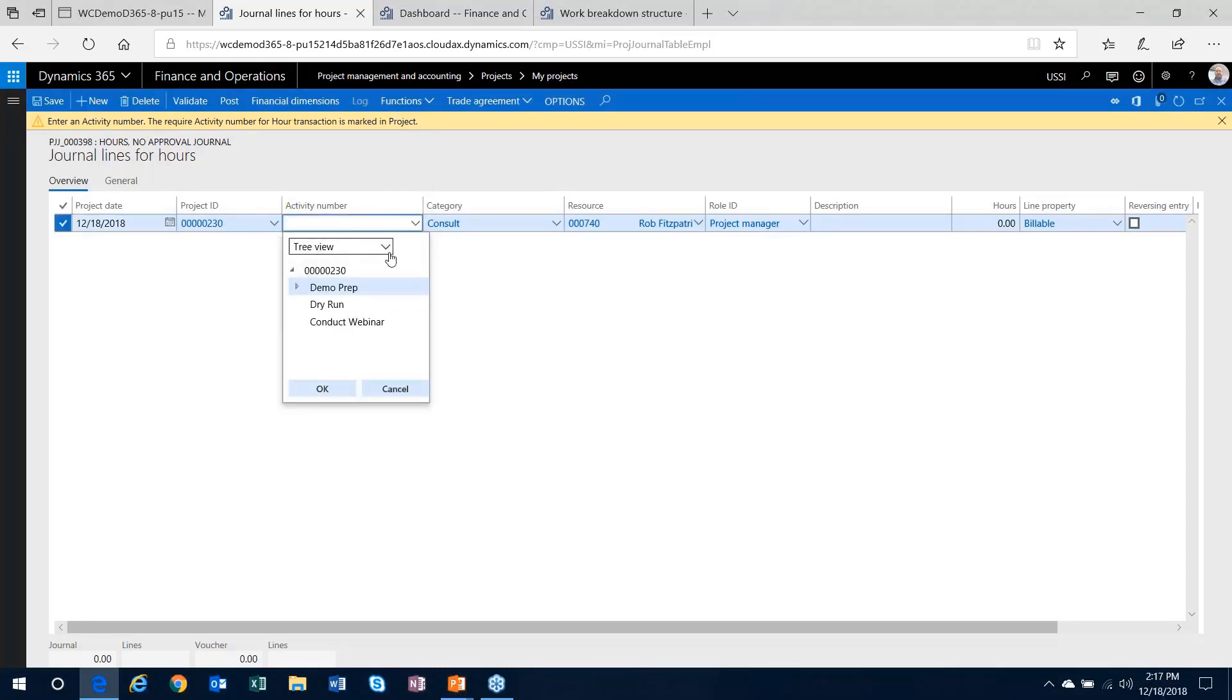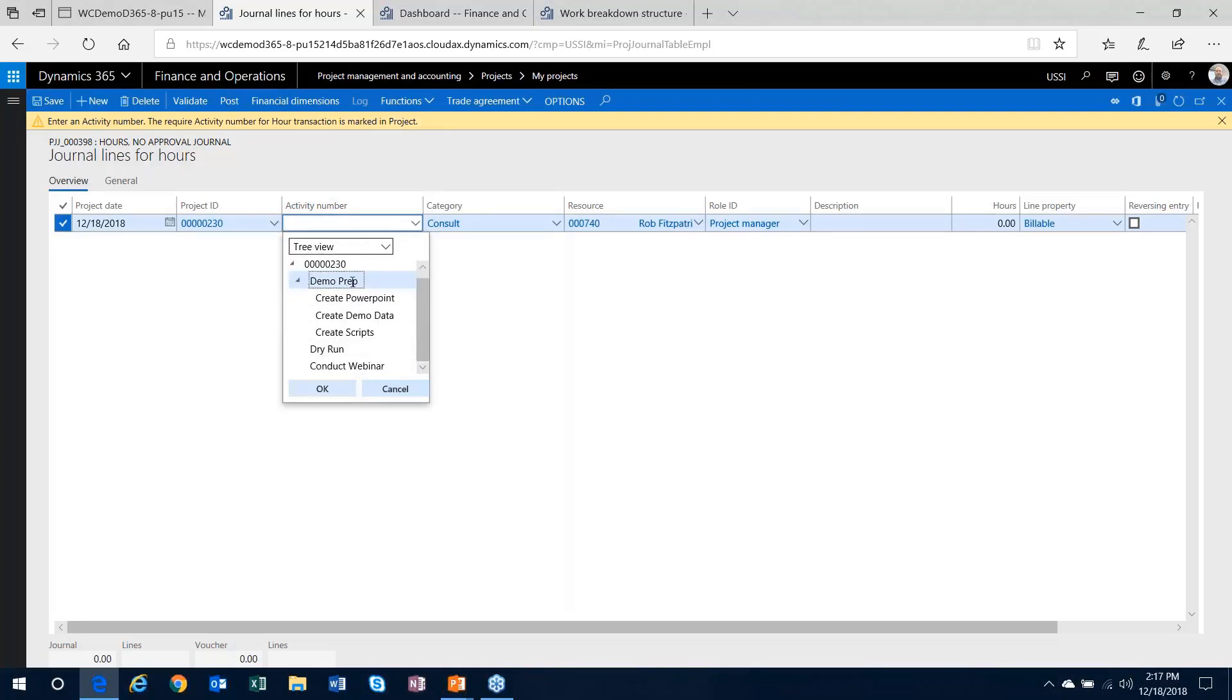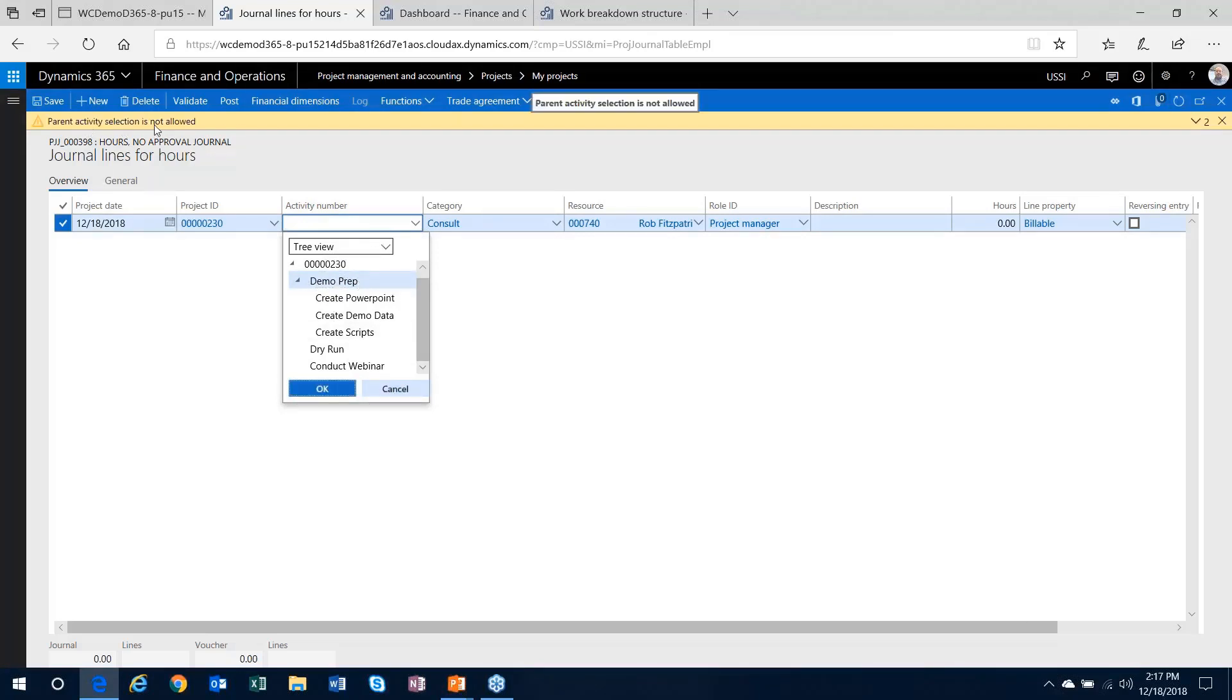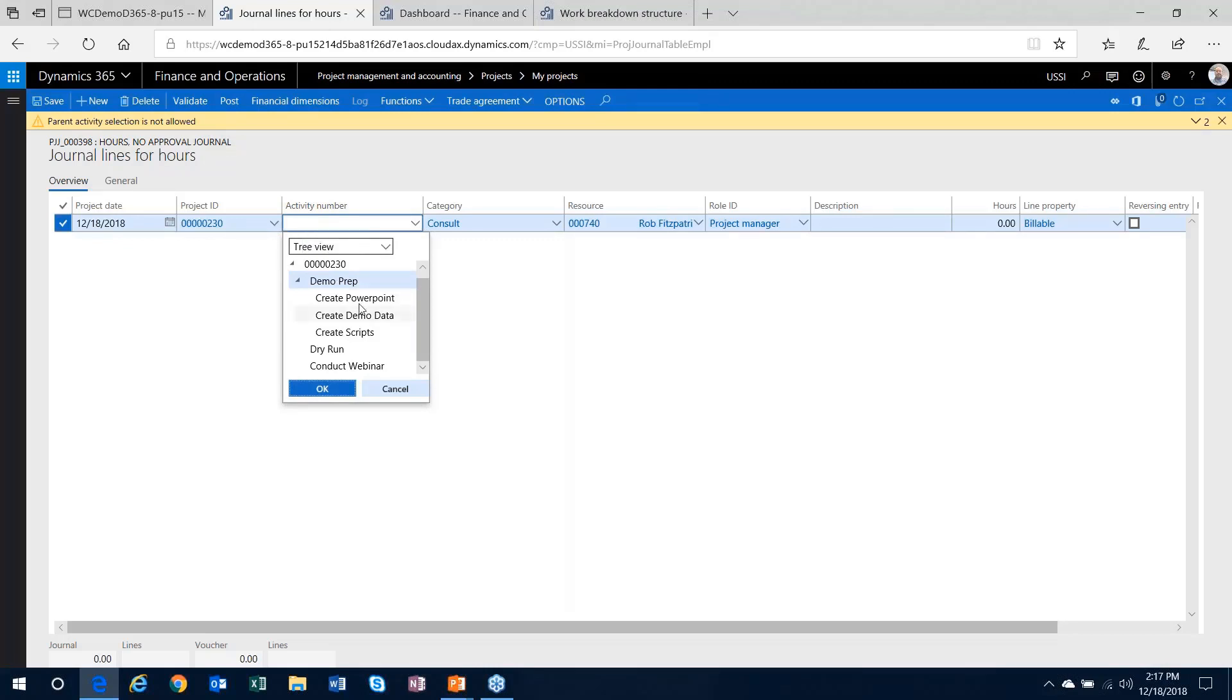Secondarily, now when you click that, I've got that tree view set up here. I can try to select one of these. Now if I select that demo prep, which is my parent activity, it's going to give me a message to say, no, I've got that parameter turned on as well. Parent activity selection is not allowed. So it will stop me from recording to that particular task.